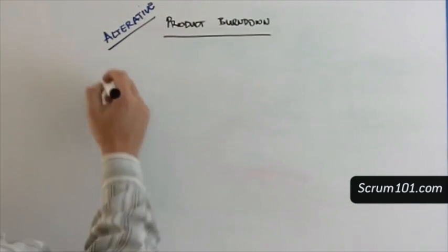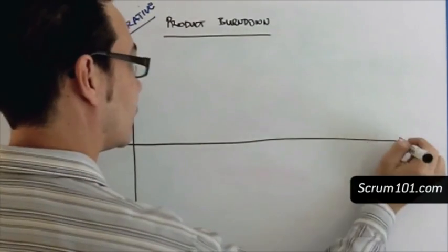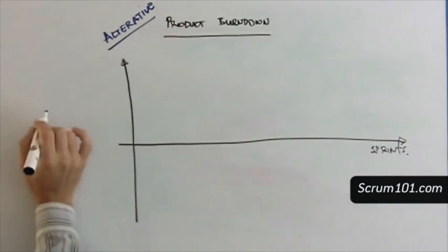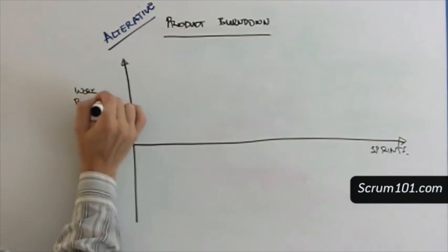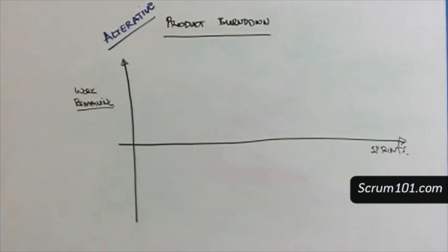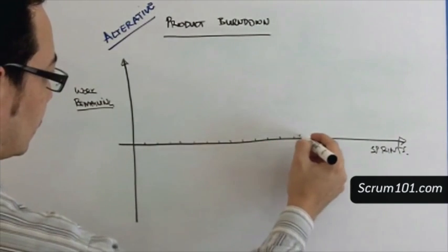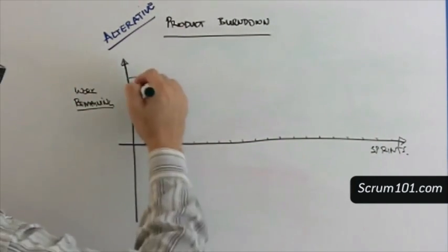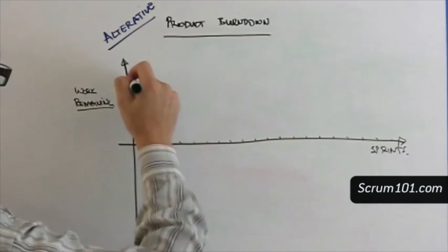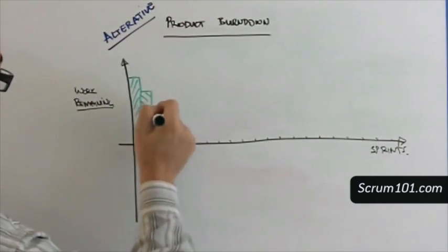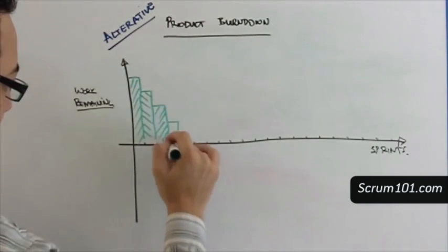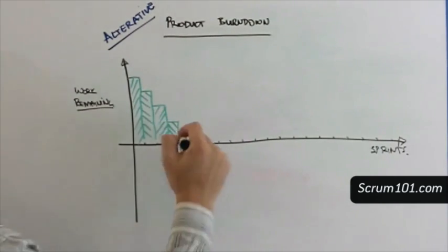Of all the Scrum tools, this is my favorite, as it tracks the behavior of the team and the behavior of the product owner. At the beginning of the sprint, the team calculates the total amount of work remaining in the product backlog, and this is plotted as a bar graph. Thereafter, any work completed by the team is taken from the top of the graph. You can see the amount of work completed by the team by the differences in height in the bars.